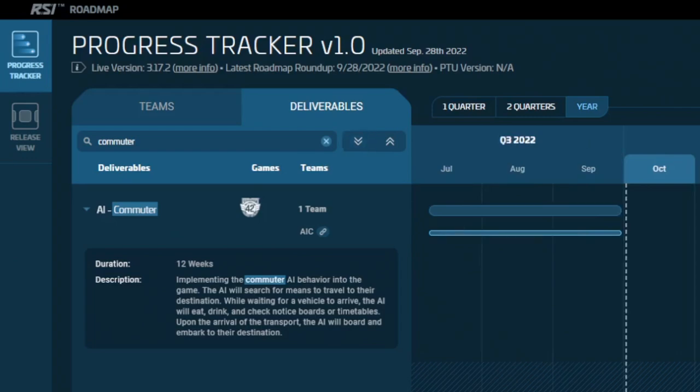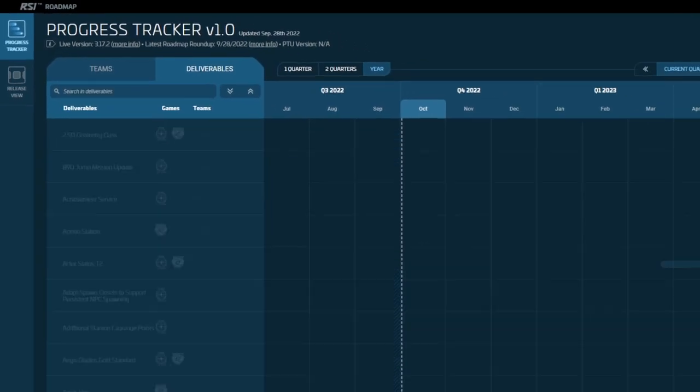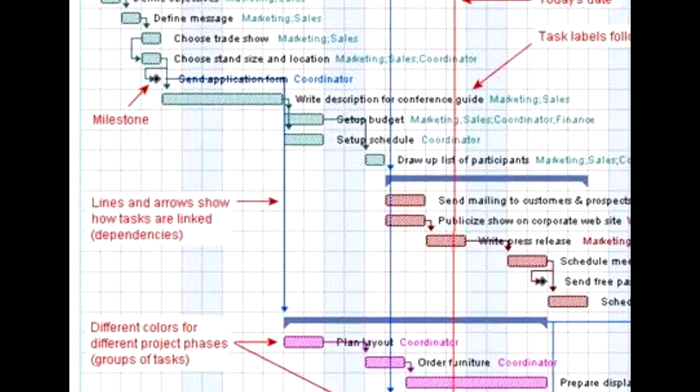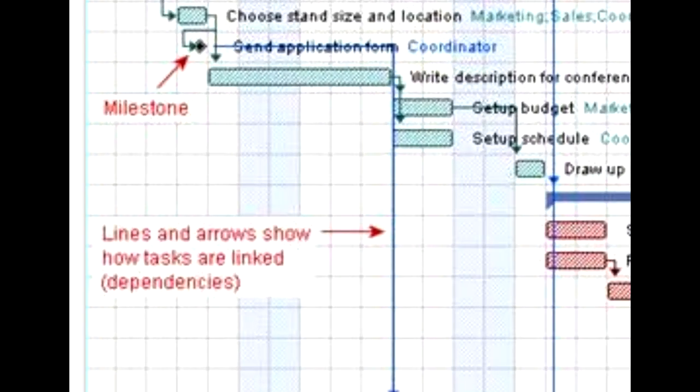the progress tracker. Dependency information. These little arrows that show what task this task is dependent on. The most common is a finish start dependency, as in this task can't start until that task is completed, or a finish finish relationship, as in this task can finish, but it isn't really done until that other task or tasks also finishes.